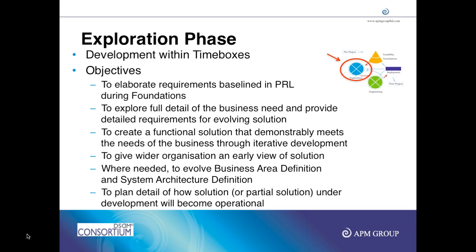As part of foundation, we also identify the project requirements and we capture them in a prioritized requirements list. So you first identify all requirements, write them in a requirements list, and also get them prioritized using various techniques such as business value or MoSCoW. The must-haves are owned by the business visionary who owns the project requirements list. For the should-haves and could-haves, empowerment for making decisions about them is provided to the solution development team. Once all these things are baselined and agreed upon, we move to exploration.